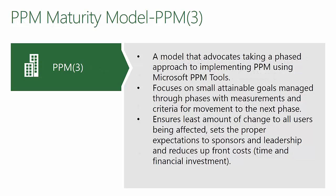The notion of the PPM maturity model is something we came up with a number of years ago. It's a model that essentially advocates a phased approach to implementing Project Online and Project Server — a focus on smaller goals that are managed through phases. Each of these phases is then scrutinized and reviewed as the organization moves through, making sure they pass each phase.